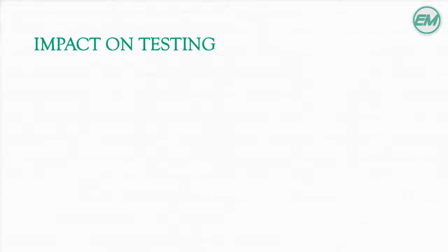The last topic we will discuss in this lecture is the impact the Waterfall model has on testing. Firstly, we know that testing starts late in the SDLC. Now this is in contrast with one of the testing principles we discussed in the fundamentals section, which stated that we should always try to start testing early. If we start testing late, the defects get detected late and fixing them becomes more time consuming and costly. So that's a huge disadvantage of the Waterfall model for testing activities.